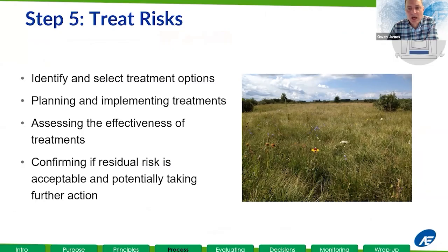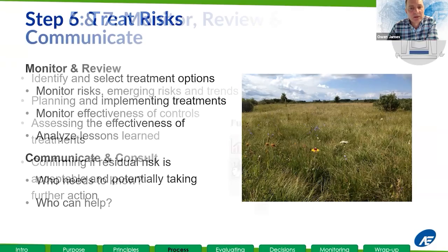Evaluate actions. Are they practical? Do they adequately address the risk? Do you already have actions in place? Do those actions work? So this is starting to link to monitoring, recording and reviewing whether actions have even taken place. Assess the effectiveness of treatments. Confirm if the residual risk is acceptable, and if not, potentially take further action. So that's the continuous iterative nature of what we're doing here.